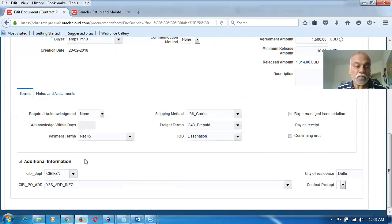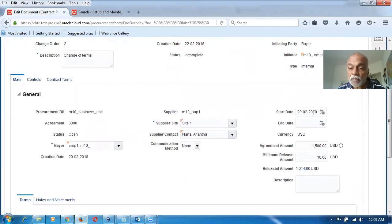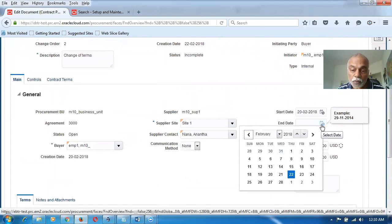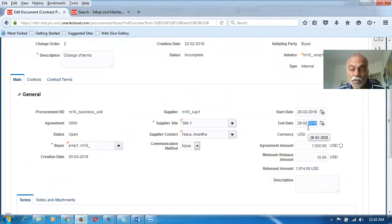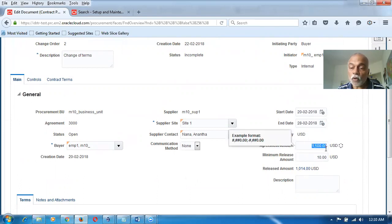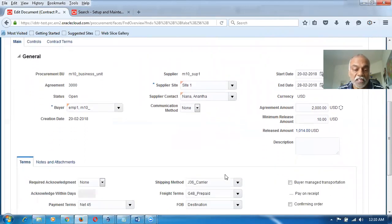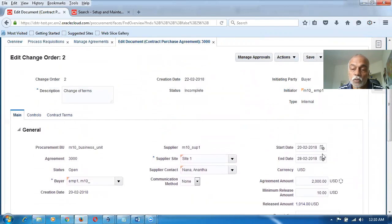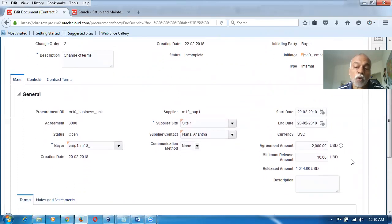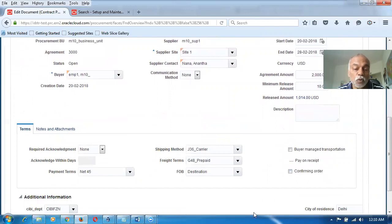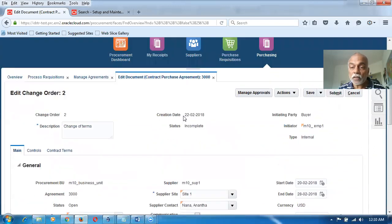So when you are discussing all these things, the supplier will now say: between this period and this period — normally a three-month period — I cannot accept for $1,500 worth of contract, but you make it $2,000. This is where the negotiation takes place between the supplier and the implementing company's purchase officer. You give orders worth this much money between these two periods, and then the deal is struck. This is going to be common for all items. Only the terms are being discussed on a contract purchase agreement — no item-specific pricing is discussed.